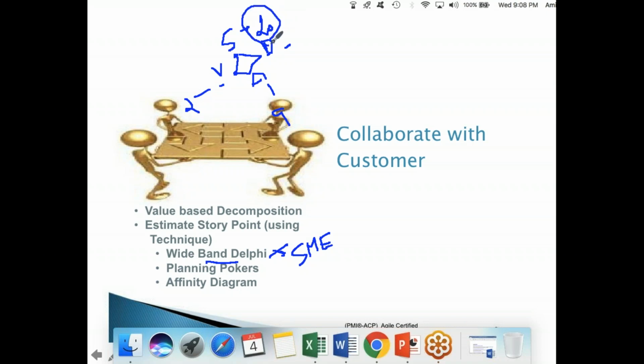So Sachin thought maybe I have to climb the tree and get it, then I have to clean it, then I have to peel it and eat it. So I say it's not required. It's already peeled, it's de-seeded, and it has been cut into pieces, and you have to eat it. So I'll clarify the doubts, and then I'll circulate the information among the subject matter experts. So normally what they do is they'll call all four, Virat, Sachin, Dhoni, and Anil Kumble. They give the requirement, and they ask them to go away, think and come back: what would be the effort for this? So they'll think and come back, and then again the discussion will happen, the one-on-one.